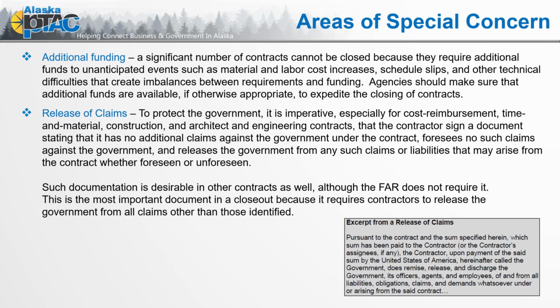And so if you have the case of a contractor that is coming back 2 or 3 years later and says, hey, I'm throwing in this request for equitable adjustment, we have these contract modifications, there's a cost associated, and those funds have since been closed and aren't necessarily available, there's a process behind the scenes of going through and capturing the funds from that particular fiscal year. It is not a quick process. And yes, it throws a kink into the entire contracting process system.